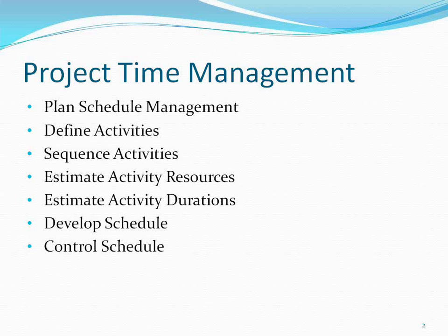On day 50, you plan to complete this work. So you have to check whether you are ahead of the schedule, behind the schedule, or on schedule. If you are not, you have to control the schedule. You have to make sure that you are going to complete the project activities as per the established schedule baseline.